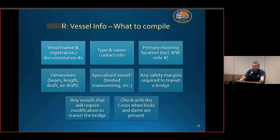Visit marinas, distribute the surveys to marinas, port authorities, work with the district Coast Guard Bridge office, who may be able to reach out to the local Coast Guard Waterways manager, and the Coast Guard Waterways folks will be able to help additionally identify who is in a particular waterway reach. They often run harbor safety committee meetings, which include the breadth of waterway users for a particular area. So yeah, I don't know that I can provide a comprehensive list. It's best to tailor your list to the waterway that you have in question. And you can do that working with your district bridge office point of contact.